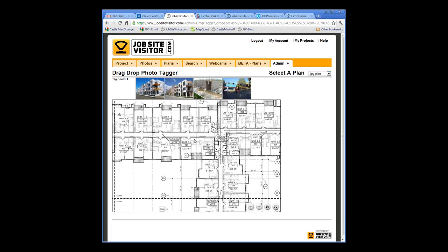They're out on the project every day, they know what's going on. I think it's better for somebody that's in the trailer or in the office that's visiting the job site once a week to be taking these photos. Not to say that superintendents shouldn't be taking photos when they need to, but I don't think they should be in charge of the daily walks. I'd give it to an engineer that's in the trailer 90% of the time and let him go out once a week and walk the site.